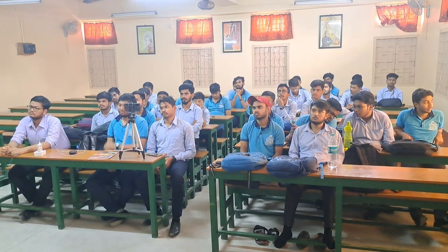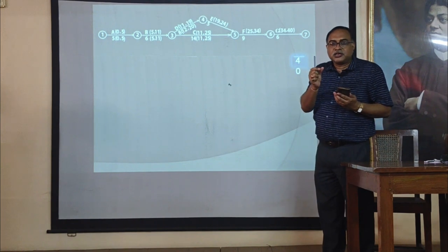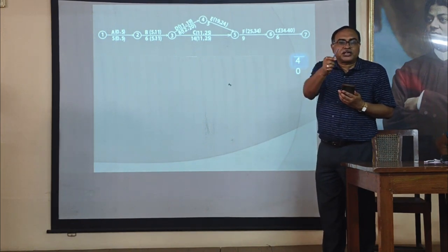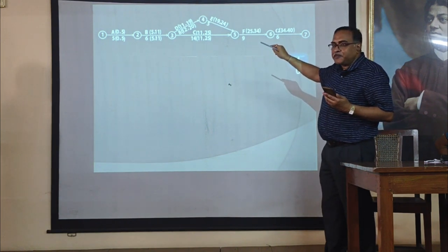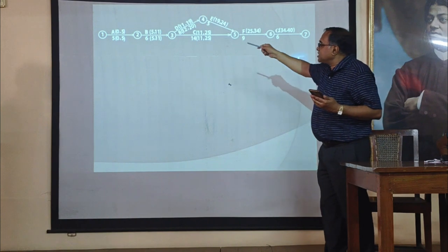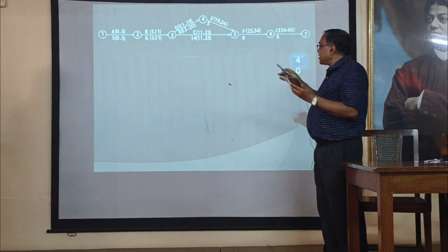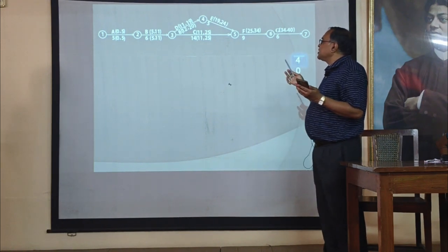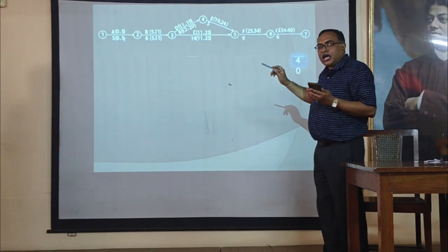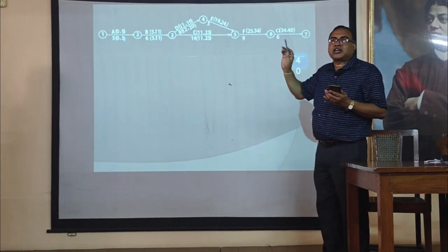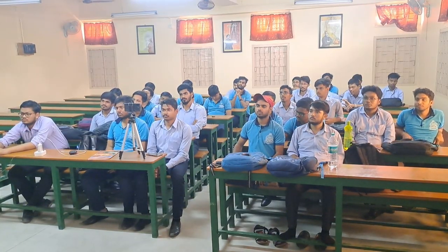Very good. Then the duration for the B activity is 6 days. So what will be the early finish time of B activity? 5 plus 6 equals 11. Understand? Okay. Then, branching: D activity and C activity. For C activity, early start time should be 11, as well as for D activity, early start time should be 11. Any confusion? Very good.